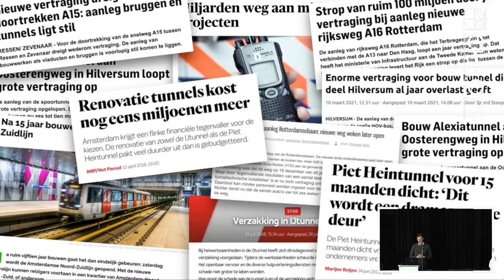That there are currently so many construction projects going on, especially with regards to infrastructure, that have cost overruns and lots of delays. So this is the public perception towards such projects. And there are several reasons for that. Mostly it's ambitious planning. It's also part of the tendering process, where everybody wants it as quick as possible and as cheap as possible, but sometimes a tender wins that has plans which aren't even that feasible.